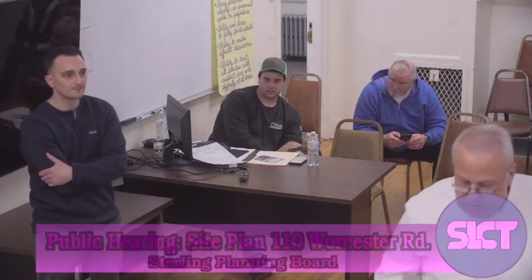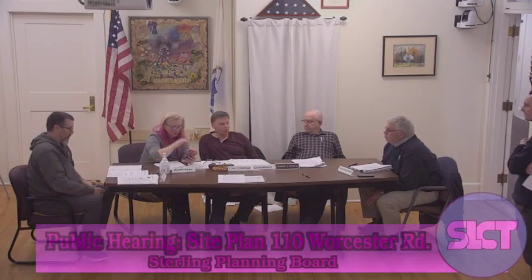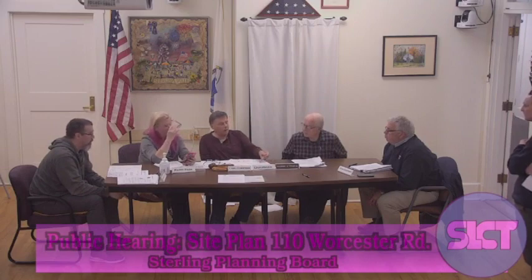All right, so now it's just a matter of timing, and parking places. There's plenty of room for parking places, we just need to put them on the plan and in the calculation. So it's 30 days for this fence here, that seems to be what we hear the most about, and then 90 days for this, and then another 90 days for this. That gives you the 6 months to complete the whole thing. Okay, I'm good with that.